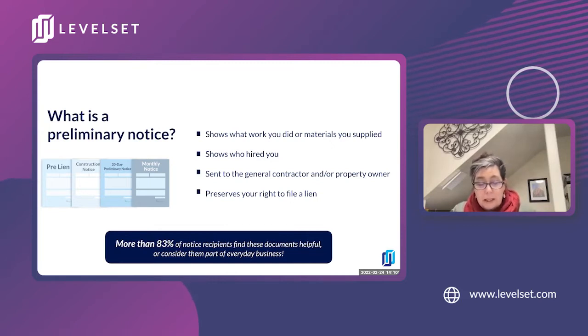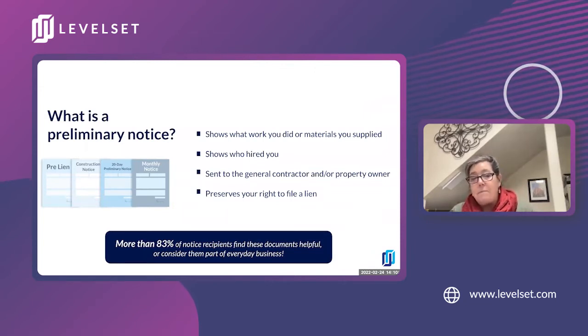So it is our policy at Mammoth that we send a preliminary notice to every single job, every single customer. Because then we're not discriminating. We're not deciding who can pay or who can't pay. And also, we started out with, okay, only jobs that are over $3,000. And then we spent more time chasing the $2,000 or the $500. When I broke it down, the cost of it was way exceeding what we could collect or what we were spending on collecting. So pretty much everybody gets one.